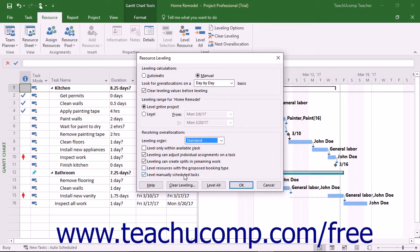You can also check the Level Manually Scheduled Tasks checkbox to include manually scheduled tasks in the leveling process in this project file.